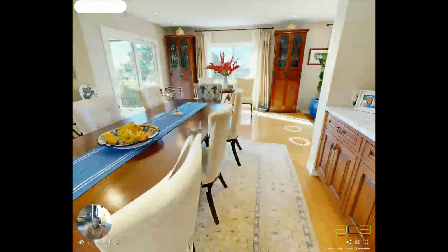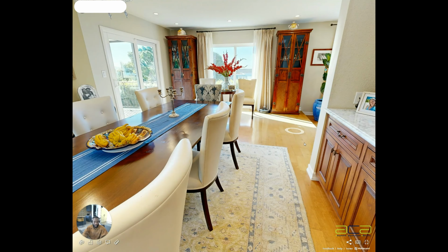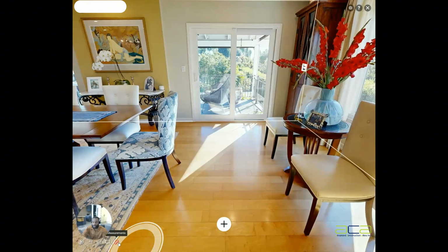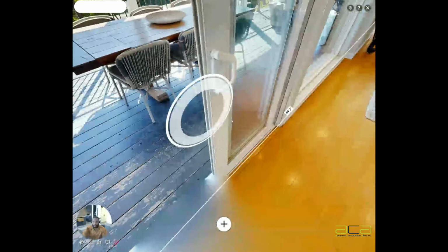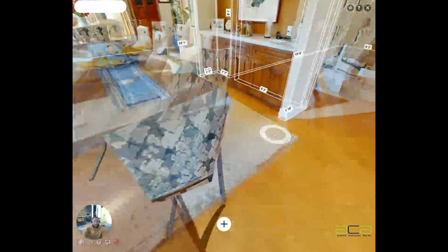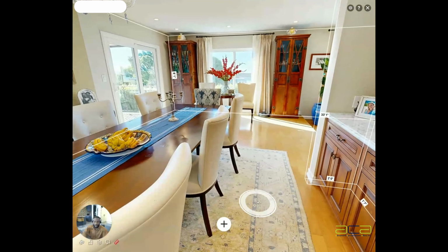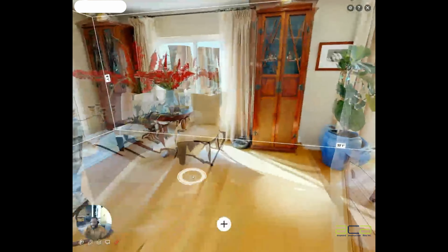One of the reasons we do the LiDAR scan, we start every project with the LiDAR scan, by the way, is because we're able to access things like dimensions, all of the walls, doors, windows, openings, all those things that are critical to understanding the existing conditions of a project before the renovation, we're able to pretty much see. And I think that also for contractors, it's cool because they don't have to go back and forth to the project site. And it's just more convenient for everybody involved.